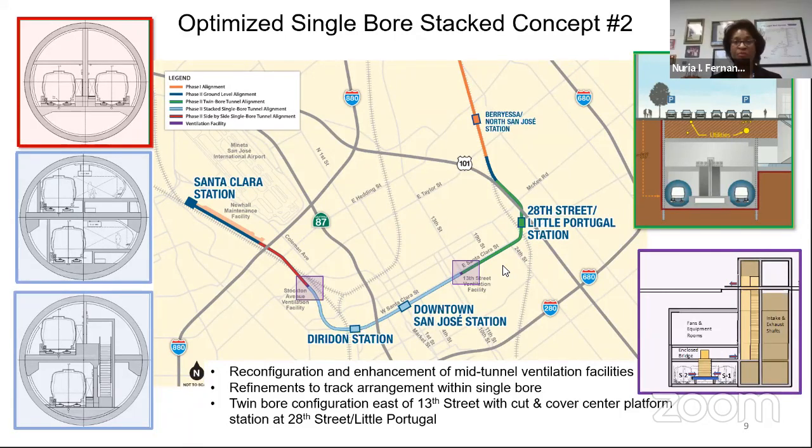Because it's a pilot program, once we submit our application and they have approved it, which is supposed to happen within 120 days, we will be getting either a letter of intent or some legal structure that commits them to providing the funding that we need, and that they will then include that in the budget.